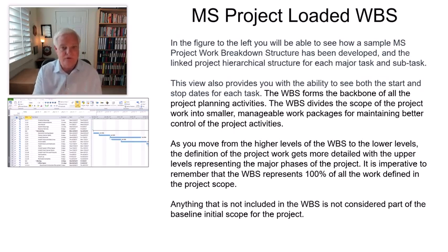This view that you're seeing here also provides you with the ability to see both the start and stop dates for each task, and the WBS forms what we refer to as the backbone of all the planning project activities. It divides the scope of the project into smaller manageable work packages for maintaining better control of the project objectives.